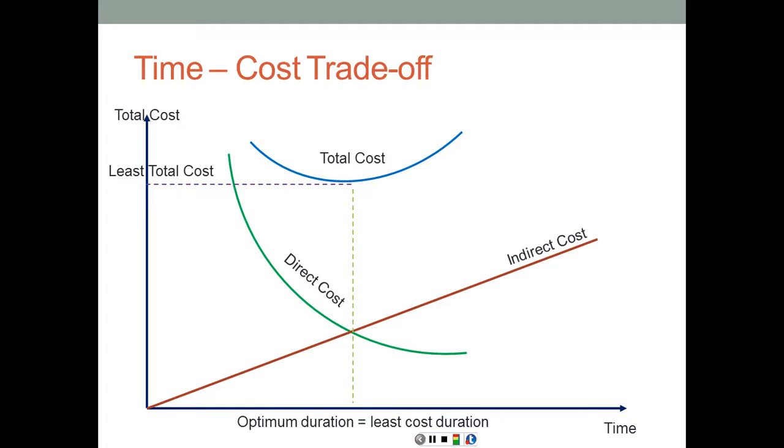If the minimum total float on the network, let's say, is 5 days, then in this case, if an activity can be compressed by 3 days, you can do that in one step to save yourself some time, because you know that by compressing this activity by 3 days, you are still going to have a minimum of 2 days of total float on the other paths, so you're not going to create any new critical paths.